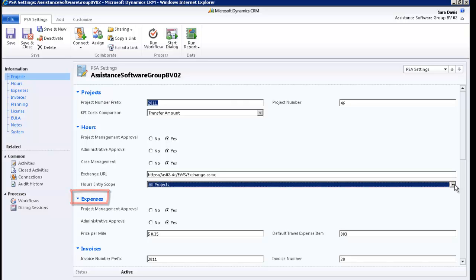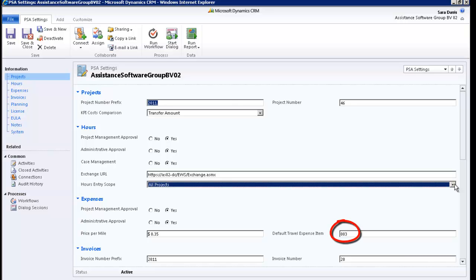The Expenses section will allow you to define if you want project management approval and/or administrative approval on your expenses. It will also give you the option to establish a standard price per mile for all your projects. PSA will take this price, multiply it by the distance entered at the project level, and post the result to the default travel expense item defined here. This calculation will be done automatically when an employee hits the mileage function in his or her timesheet. Note that the expense item must be part of the project's WBS in order for both the calculation and posting to be done automatically. Also note that you can overwrite the standard price per mile at the project level.